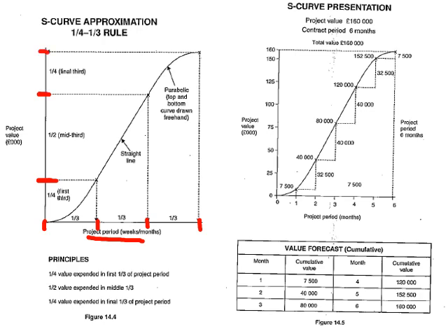Okay, then your S-curve representation, present value is 160,000. So they just made an example here of how it will actually look, and you can see that this principle is more or less the same. So this is a very quick way of getting to a cash flow projection. Usually when you check cash flows given to you by contractors, this is also a very good way of just checking whether their cash flows are actually within the ballpark.